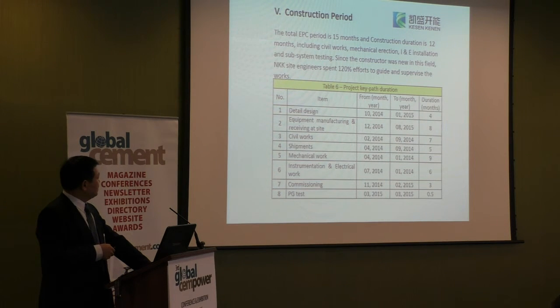The total EPC period is 15 months, and the construction duration is 12 months. It's very fast for this project. When the contract was signed, the counting time started once we received the down payment, and the finish time should be within 15 months. And we made it. This is the farthest project outside of China in the world.